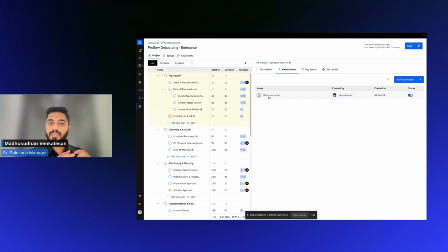But it's not just helping users minimize the repetitive tasks. It's also what insights you as a manager or leader can get from the process. Because a lot of times there needs to be some governance with project management to ensure that things happen in a timely manner. And to that point, for example, if there's a billable milestone, right? If there's solution approval, which is a pretty important task or event in the project, and if it becomes overdue, it's going to spoil the go live date. Or if it becomes overdue, there's revenue leakage, not able to bill the customer or recognize the revenue on time,